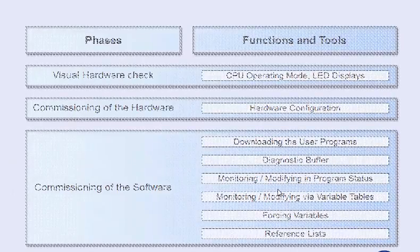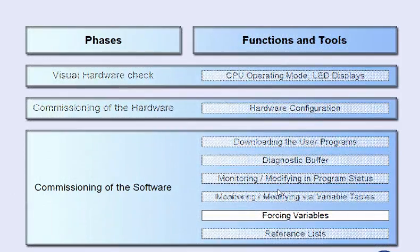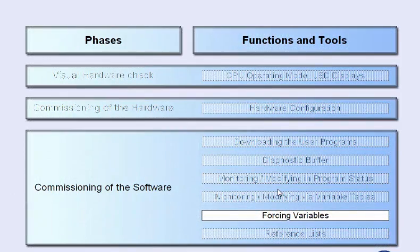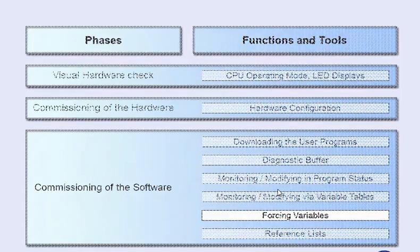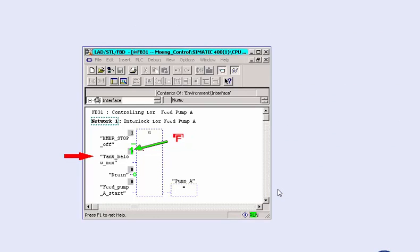With a variable table, you cannot only do monitoring and modifying, but also forcing. In the initial commissioning phase, for example, this function enables you to set still-missing input or output signals to a fixed value, such as permanently switching on a pump independent of the program logic operations.